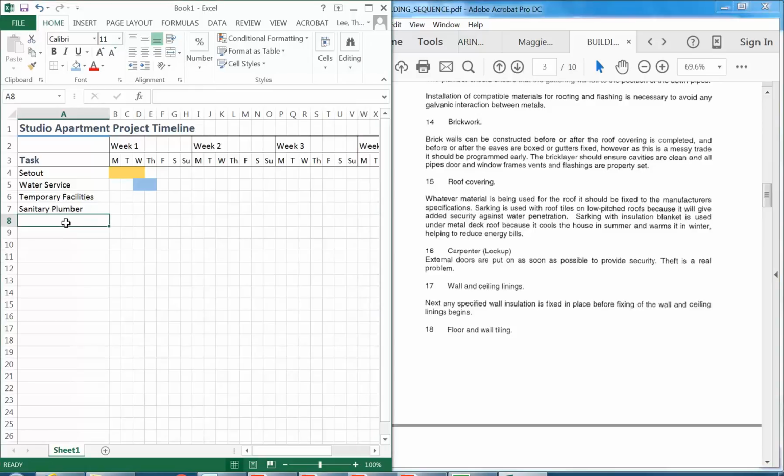That's right, many things can overlap, and that's a really good way of cutting down time in your project when you work out that some things can happen at the same time, and if you get delays, you can sometimes bring things forward if it's possible. Yes, that's right. So if it's a large project, then they could overlap. But if it's smaller projects, it's more difficult. So again, you just need to work those things out. Larger projects, they'll have more time overall for those things, though. So again, those are all things you need to plan out.